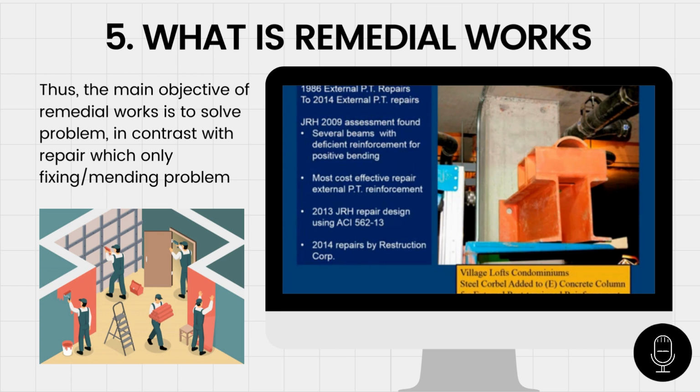The drafter wrote number sixes when it was designed as number nines for positive reinforcement bars. Pretty significant error. The most cost-effective repair was external post-tensioning. And I ended up using the design based on the